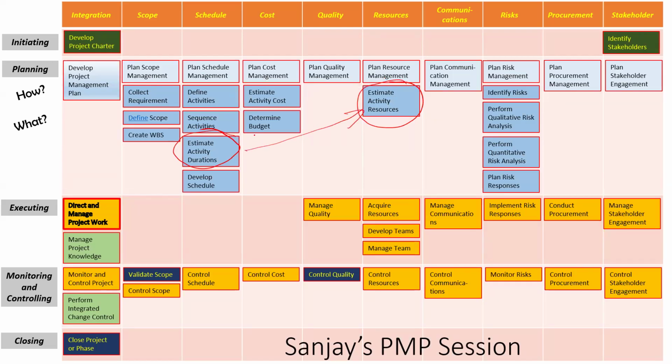Why? Because you said that this is going to take, let's say, 40 person days. Have you heard this term called person days? Those are hours, 8 hours, whatever the business hours are per day. So 40 person days could be delivered within 8 days as well. Correct, Maria? Yes, with more people. Now this 8 is the duration. And the resources are 40 person days. Now what is this particular thing saying?